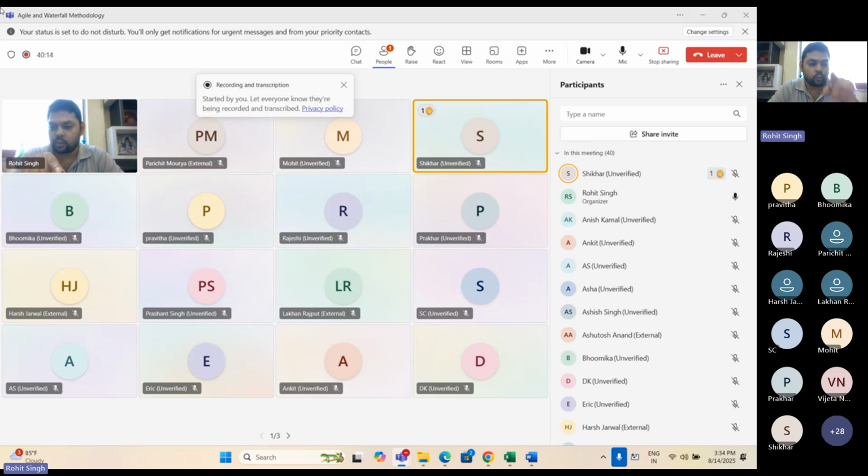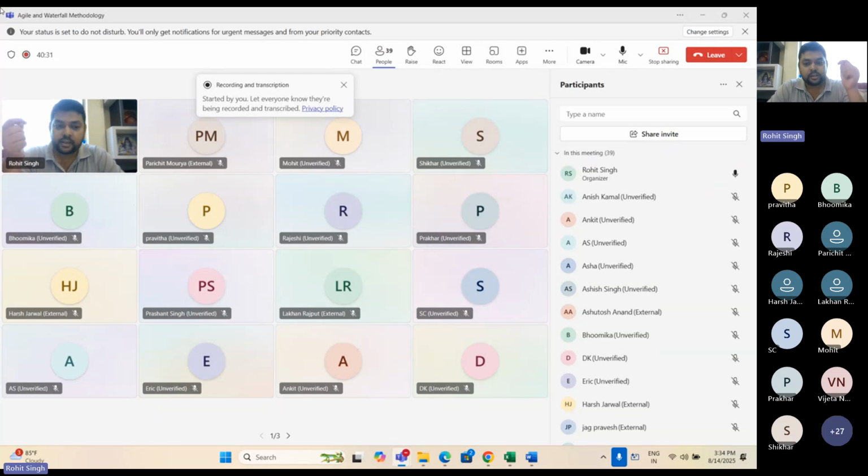What are they? At least 2 points: time and budget. Why can I not control these two things? Because I'm following Agile. And when I'm following Agile, the client will be giving me changes, enhancements, issues, escalations, and evolution. Client as well as my technical team.